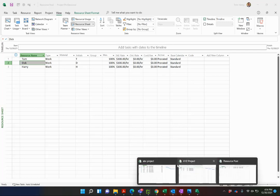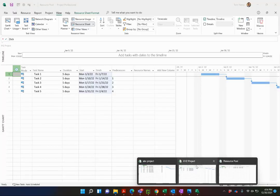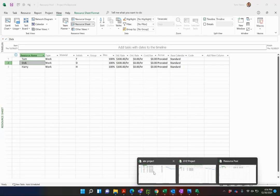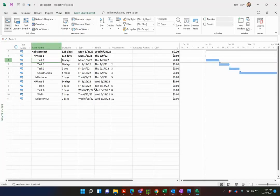So I currently have three schedules: ABC, XYZ and resource pool. I'm going to go now into the ABC project and share that resource pool that I created with this project.